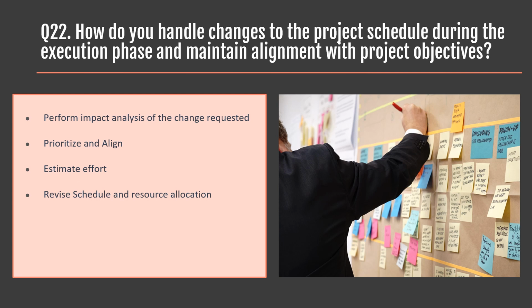Since this feature would increase customer engagement and retention, Mary prioritized it against existing tasks and objectives. She evaluated how much time and resources would be needed to design, develop, test and integrate the loyalty points system into the app. She reallocated the resources and also considered bringing in extra help. She also developed risk mitigation plans.